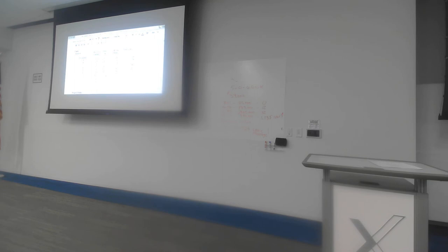So €143 plus nine is 152. Another €8 will be given back to me by the client by crashing it for another day. So that's minus 56. And so the total cost is 152 minus 56, which is €96.